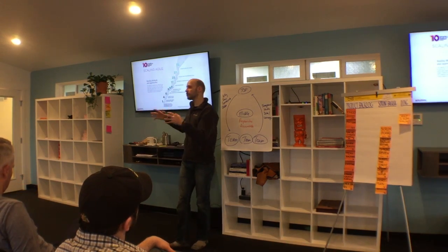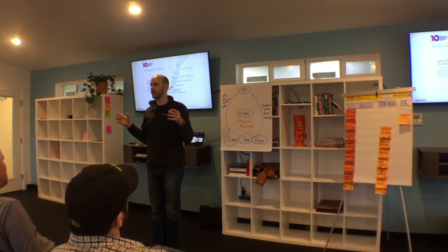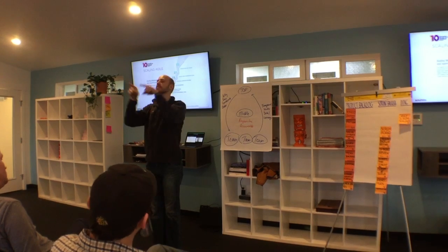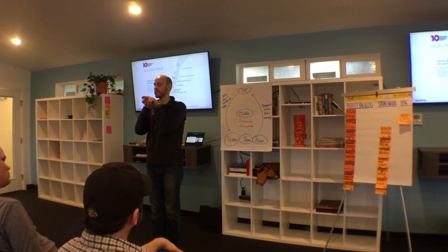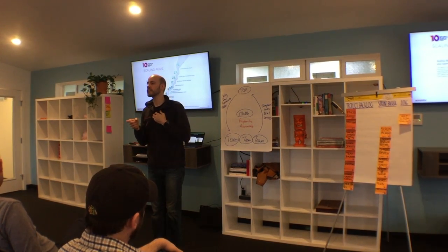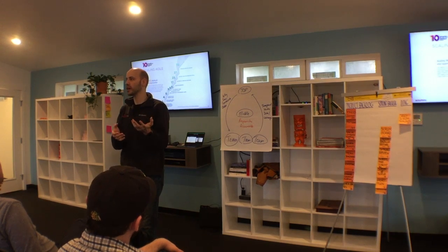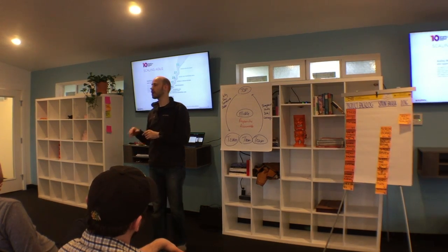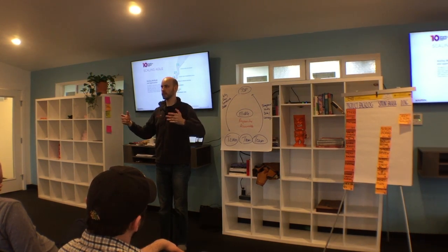This is how multiple teams work together. If you have one Scrum team, you don't yet need to do this. If you have 3 Scrum teams working together to achieve a common goal, they'll have a daily stand-up after the daily stand-up to coordinate impediments and decelerants and to help share impediments. But what if a team has an impediment and another team already solved it? They mention it here, and the other Scrum Master has a chance after the stand-up to say, my team tried this. I'd like to help you try it. That's what this meeting is for. Or HR is going to have to change policy to knock that impediment out. Which one of us is going to then go to HR, right? And which they do, right? So refactor the organization.